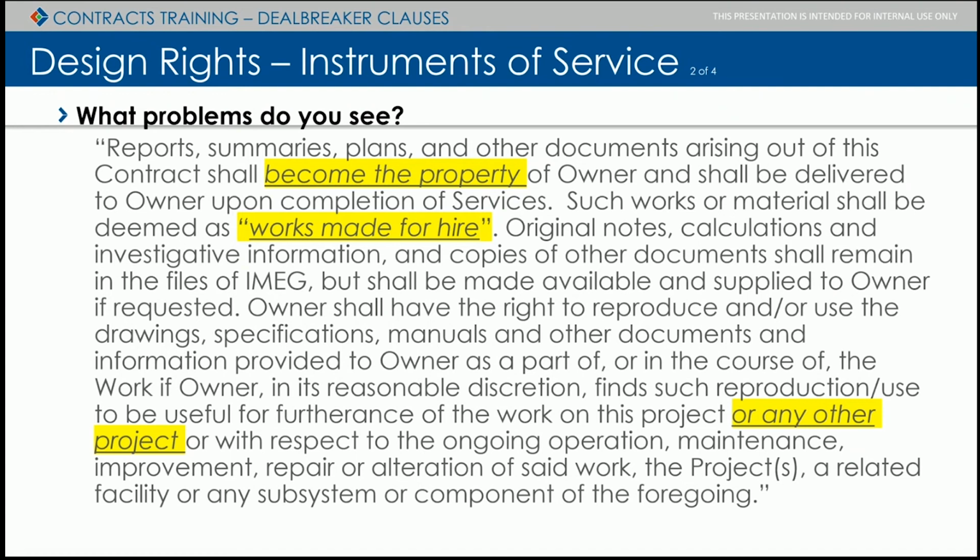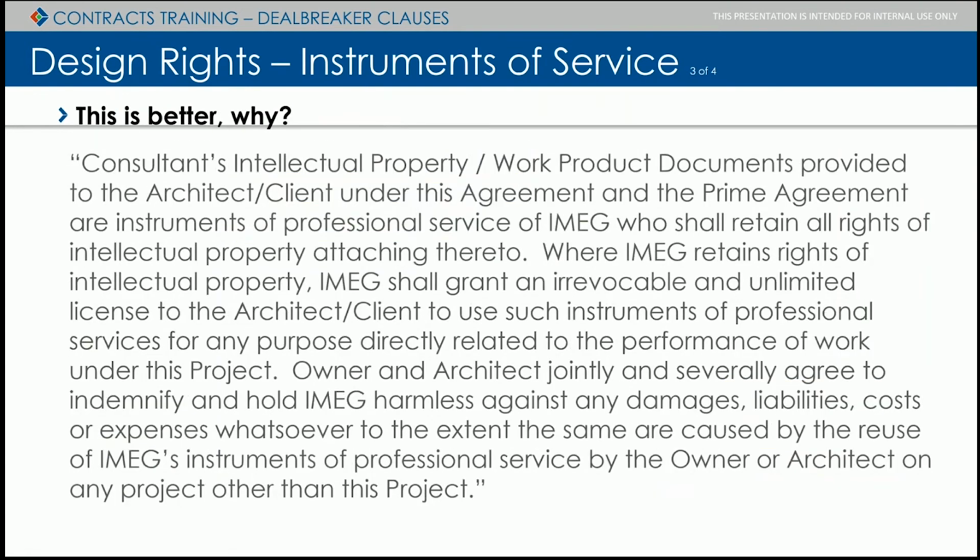And really what I give you is an example here of why this is better, again, for reference purposes only. You can compare them and see why it's better, mainly because we retain the rights, which is always good. And we give an unlimited license to use the instruments for the purpose directly related to the performance of work under this project.